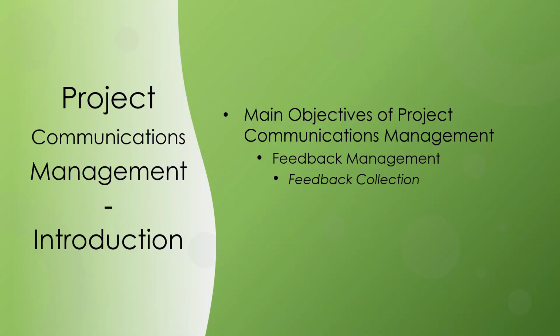This involves creating channels for stakeholders to provide feedback, whether it's through surveys, suggestion boxes, or direct communication with project managers. Once feedback is collected, it needs to be analyzed to extract valuable insights. This analysis helps project managers identify areas where improvements can be made and concerns that need to be addressed promptly. Project communications management is an iterative process. Feedback collected from stakeholders can lead to adjustments in communication plans and strategies, ensuring that the project remains responsive to changing stakeholder needs and concerns.